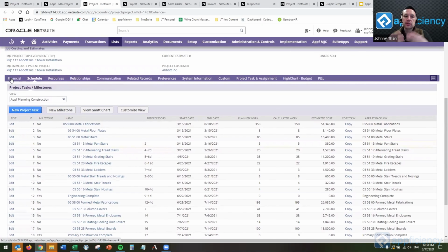So I'm going to try and hit a 64,000 range. So that's going to be 8,000 here. And so I can put my 8,000 like this, and I can copy paste it into each cell. Or I can do this immediate peanut butter spread this way as well, and I can put in 8,000, and I just auto-fill it all up. Refresh my screen, I get a new total. Oh, I'm at 64, nice and clean, great.